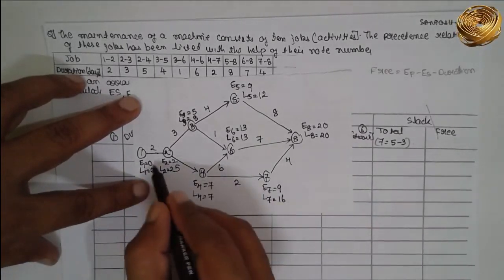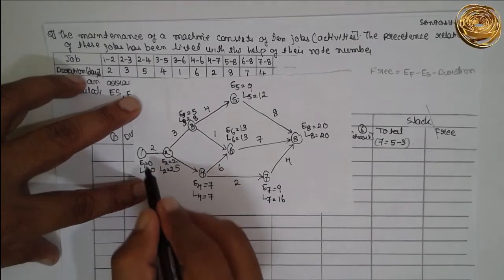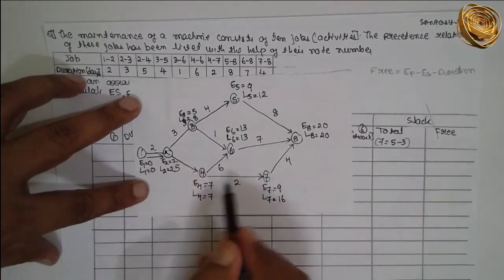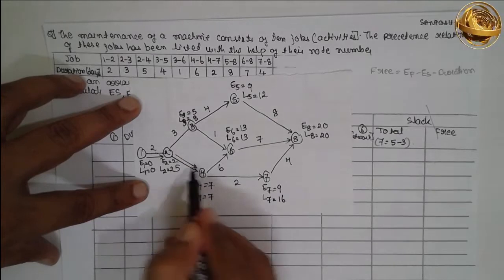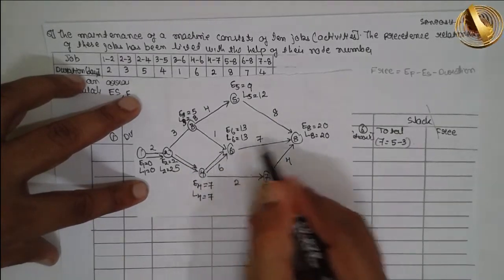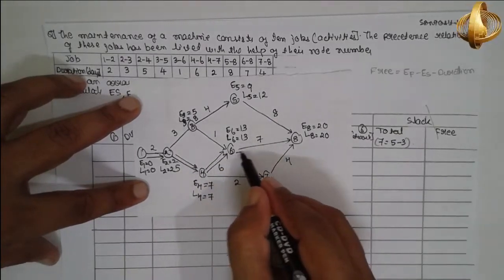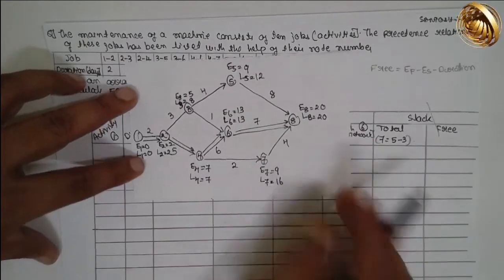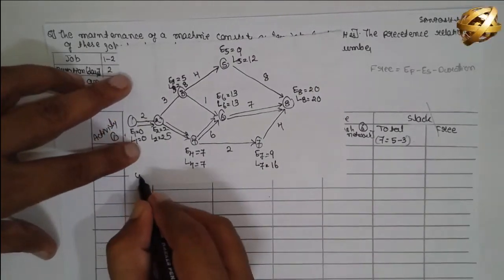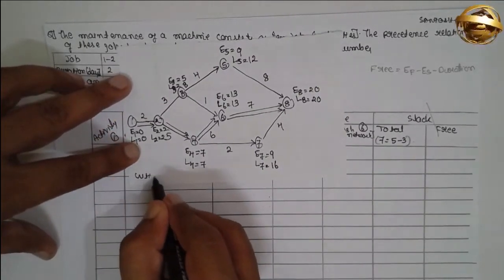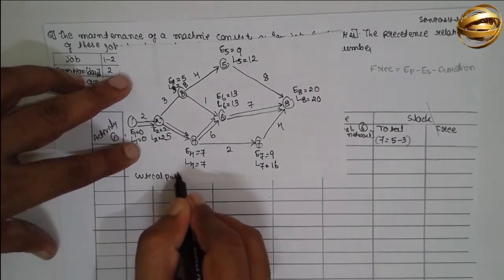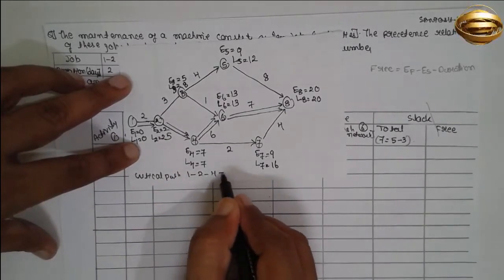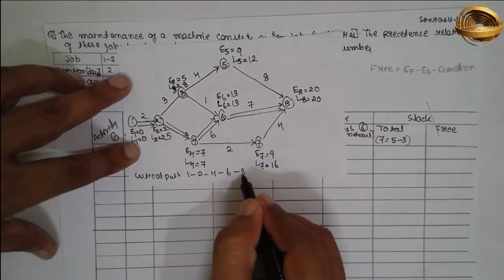Now see the critical path. Where E equals L: node 1 (0,0), node 2 (2,2), node 4 (7,7), node 6 (13,13). So the critical path is 1 → 2 → 4 → 6 → 8.